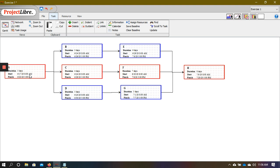If we look at the bottom path A, D, G, H, we find that this is 23 days in length. So 23 subtracted from the critical path duration of 24 gives us one day of float. So D and G both have one day of float time available, meaning that D could be delayed by a day or G could be delayed by a day, yet we will still be able to complete the project within 24 days.